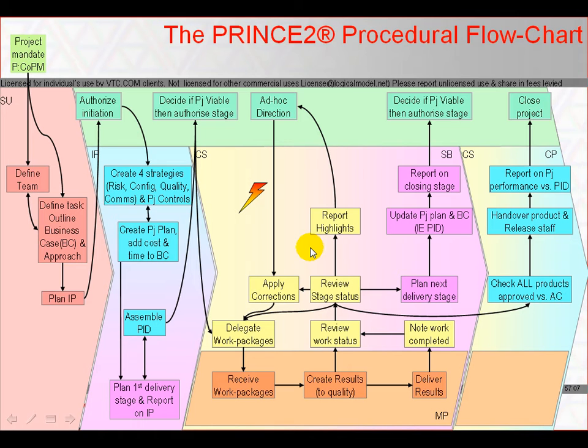When a risk or issue arises, it is logged and examined. If it is inside the project manager's authority, corrective actions are taken. If it is outside of the project manager's remit, an exception report using Appendix A10 is raised to the project board to consider. They may consider the matter acceptable within current arrangements, or they may amend current arrangements within their authority, both of which result in corrective actions.